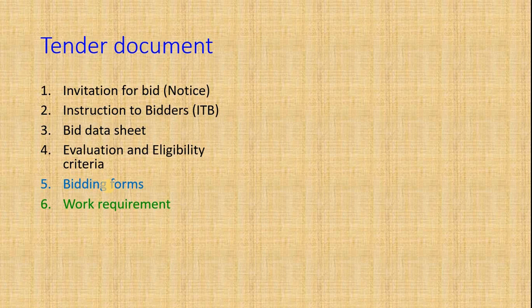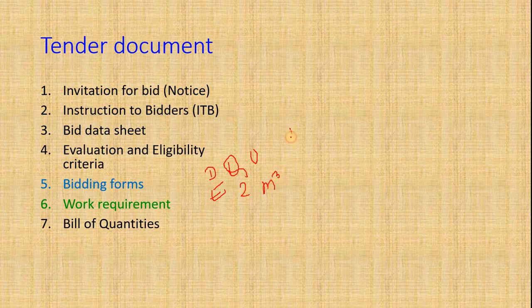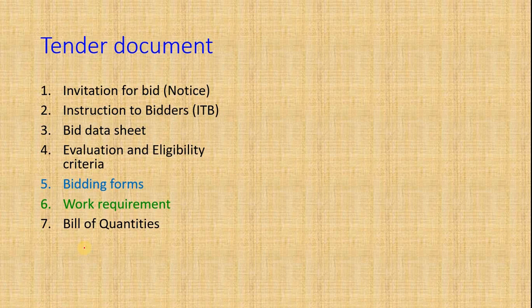Next are Bidding Forms, which contain bidding forms, work requirement, and Bill of Quantities. The Bill of Quantities — BOQ — is prepared by the public entity. Only quantities are mentioned, not rates. There will be a description of items, quantities, and units, such as for earthwork — suppose 2 cubic meters — and the rate is left blank to be filled by the contractor. The total will include subtotal, VAT at 13%, and grand total, which becomes the contract price. The lowest bidder who is also eligible will be awarded the contract.